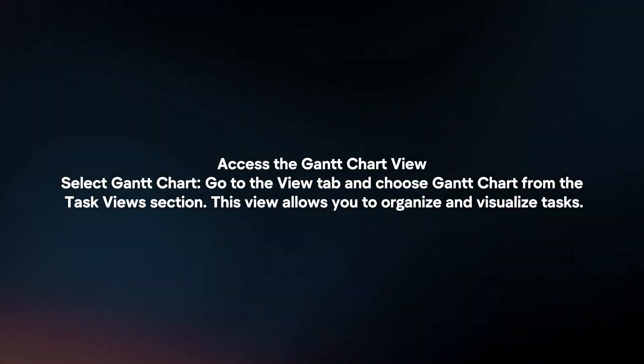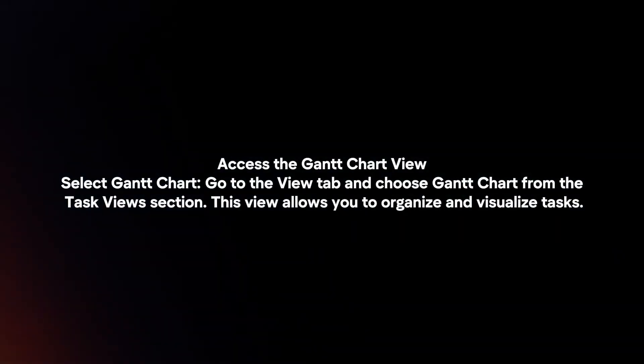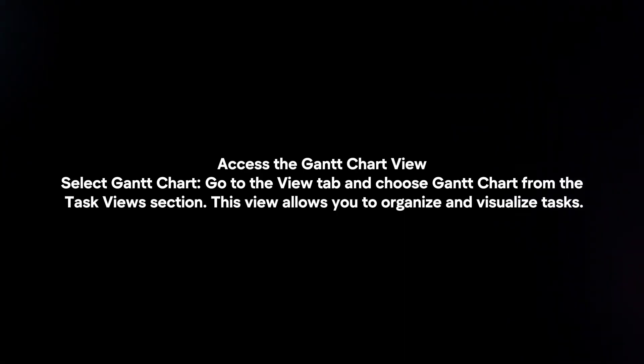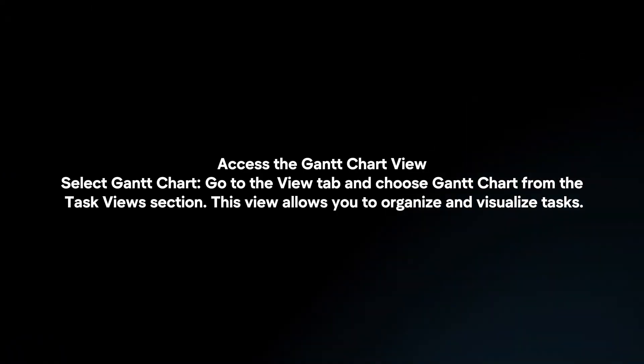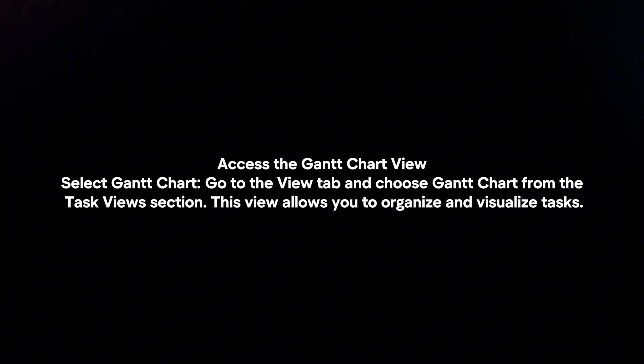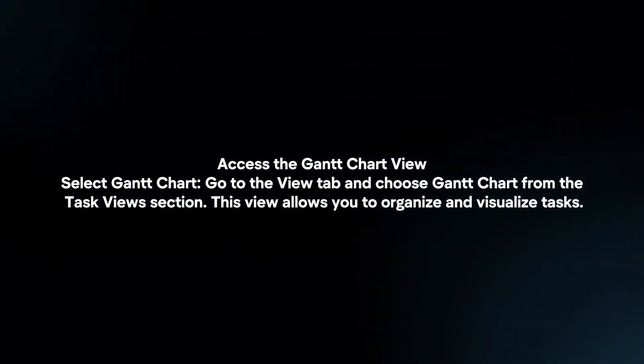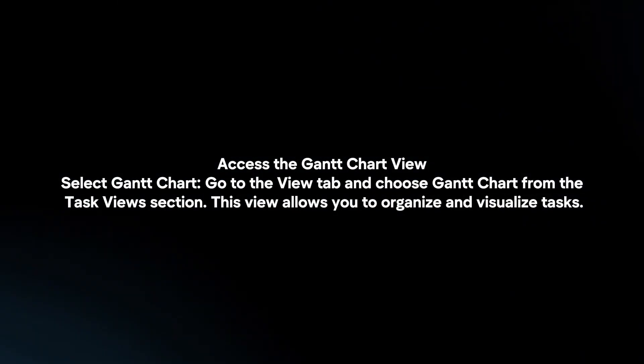Access the Gantt chart view. Go to the View tab and choose Gantt Chart from the Task View section. This view allows you to organize and visualize tasks.